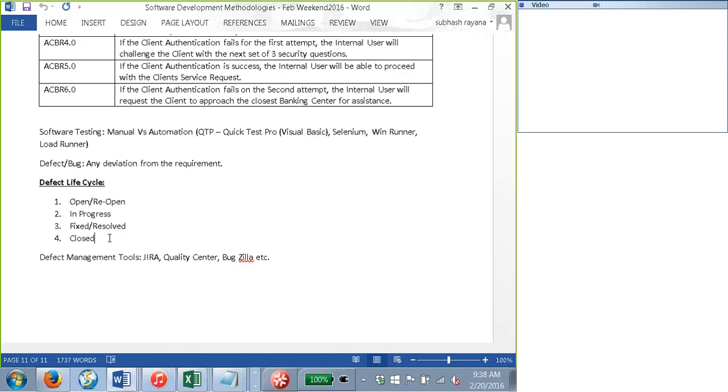I'll tell you a simple example of what I used to do. As soon as the requirement gathering is complete, the business analyst has nothing else to do apart from managing this. I was working closely with the technology team, and on a daily basis, I used to set up meetings with the testing team. We had around 15 to 20 QA people back in India. Every day at 9 o'clock in the morning, we used to have a meeting, and they used to send the report 5 or 10 minutes before the meeting. The report contains all the defects they have identified.